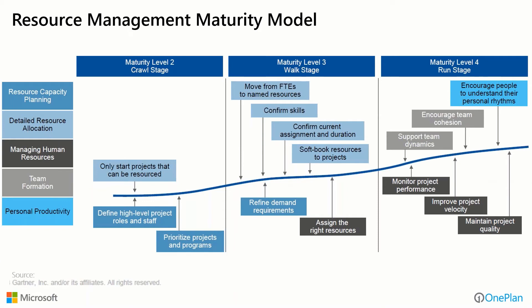The Gartner Group has published a resource management maturity model. It describes maturity level two — the crawl stage — where the majority of focus is on higher-level resource capacity planning: defining high-level project roles and staff, and then prioritizing projects and programs based on that higher-level view. It's like a sanity check: do we in general have the right skill sets, people, and numbers of people to get the jobs done?